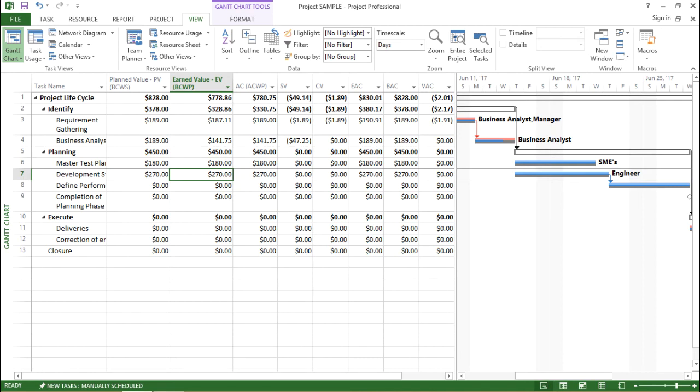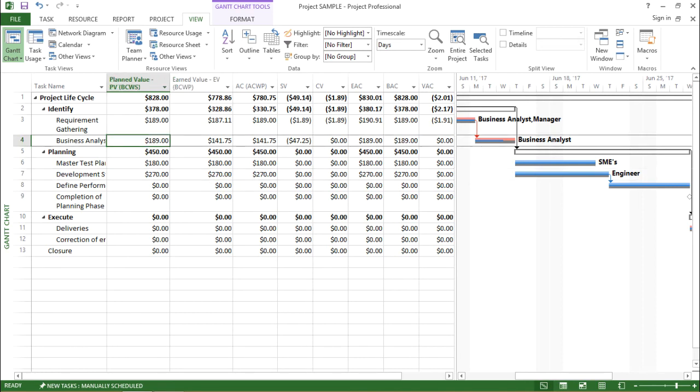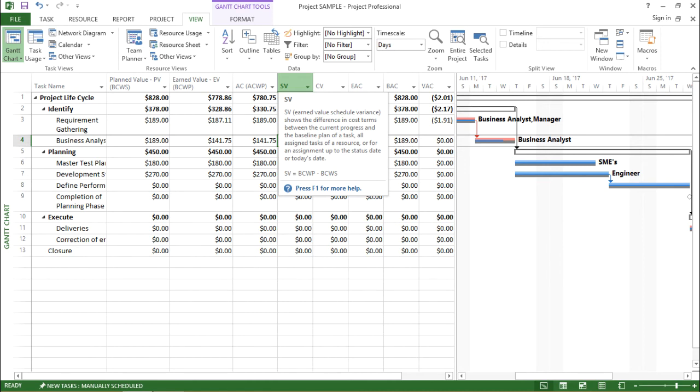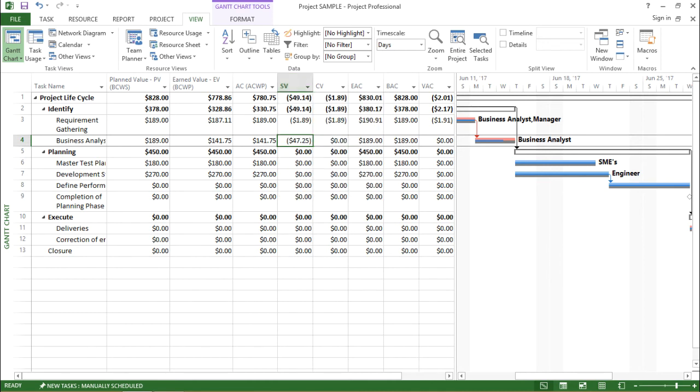For task ID 4 that is business analysis, there is a difference. And that's why I can see there is a schedule variance as well. If I go to the schedule variance tab, you can see there is a value. So this value is the difference between the planned value and the earned value.